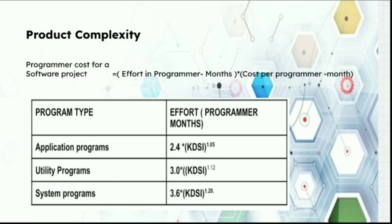Product Cost for a Software Project equals Effort in Programmer-month into Cost per Programmer-month. We have three program types: Application Program, Utility Program, and System Program.